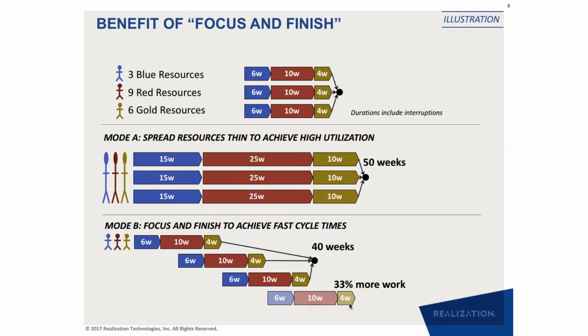If you are falling behind in a project, the way to recover is to apply extra money or resources to the project. The reliability of commitment comes from resources, but the internal flexibility is saying that I was supposed to start working on a feeding chain task today, but I can delay this task for a week or two because my critical chain is still not finished. That is what I mean by flexibility.